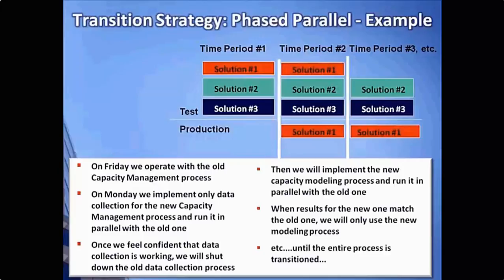Note that because we're dividing things and cutting things apart into pieces and processes, a lot of interface solutions, temporary tooling solutions, temporary data stores will most likely be needed so that data can be read by both the old and the new processes. And then after we've built all of that, those items will then be thrown away once the new process is fully in a production mode. We don't need the old one anymore.